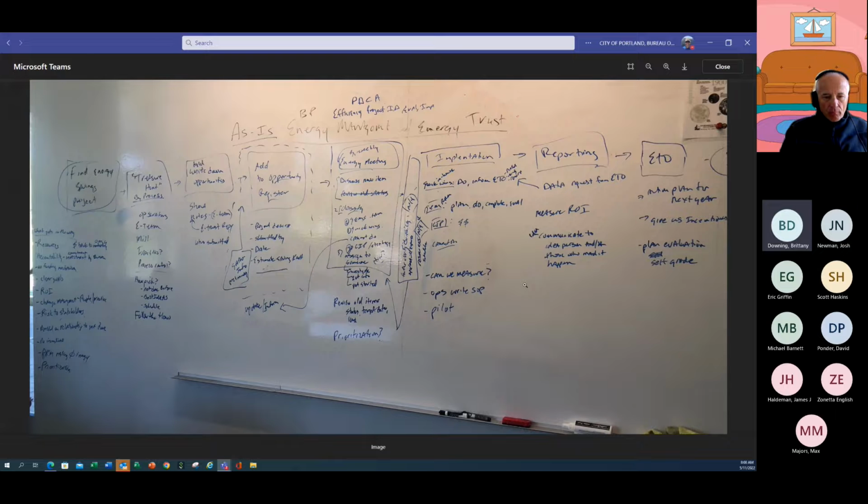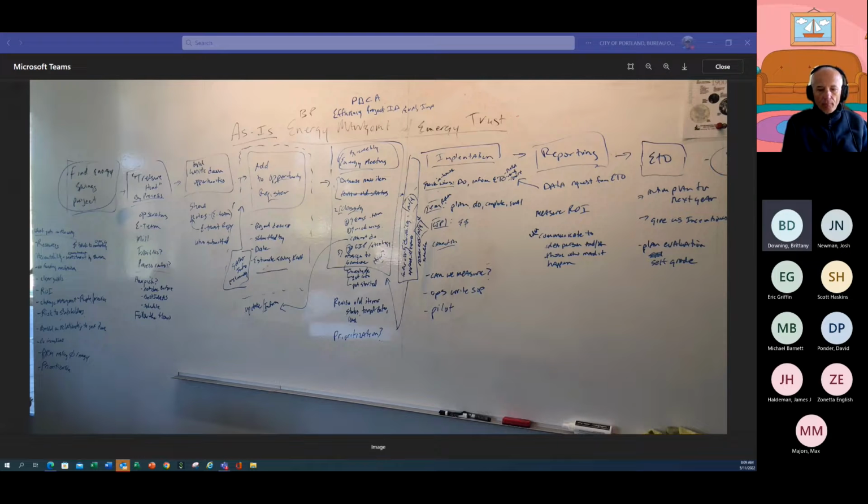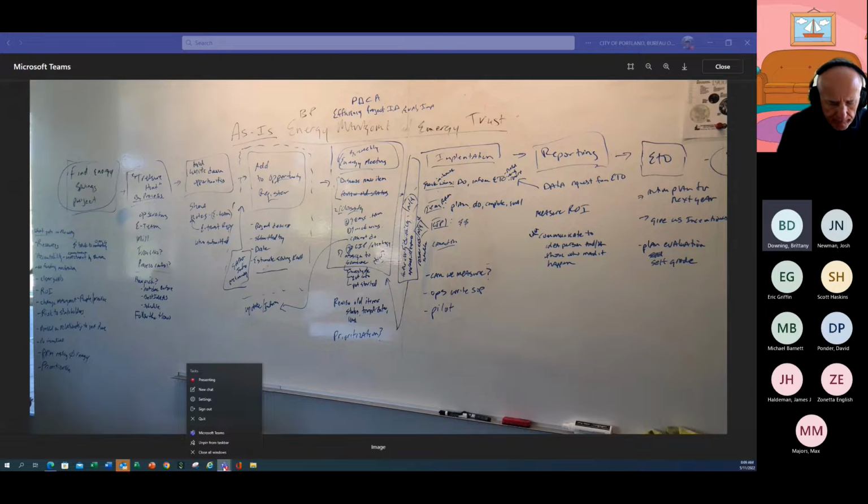And then we typically just pick a process area, and we'll usually go with the flow. So we'll start at headworks and then go to the dry weathers. We'll just pick a day and spend 3 hours walking around, looking for those potential energy savings. So then in the next box, that's us writing down the potential opportunity, and usually our Energy Trust representative captures those opportunities. And then we'll come back to our opportunity register and jot those suggestions down. In the opportunity register, I'm not sure how many other people use one, but you just give a description of the project, estimated savings, who submitted it, and some basic information.